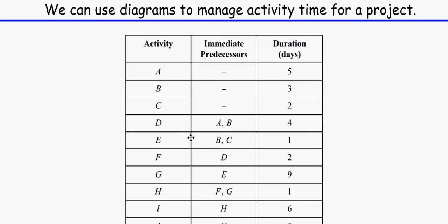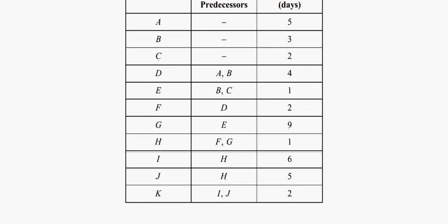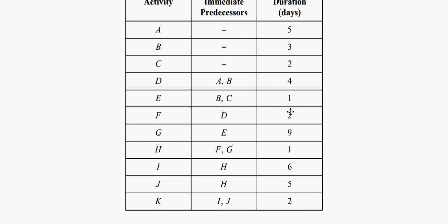For activity E, B and C need to happen first, and E only takes one day. The minimum start day will be day three, because even though C takes two days, we still have to wait for activity B. It goes on like this, and as you can see the longest one takes nine days, which is activity G.